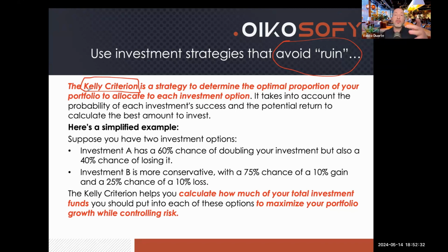Right? So let's say you start 5 projects and they're all going along, and every now and then you review how close are we to the target on each of these 5. And for those projects that are less close to the target, so further away from the target, you start reducing the investment. And this is counterintuitive because in fact, in most portfolios, we have the opposite.